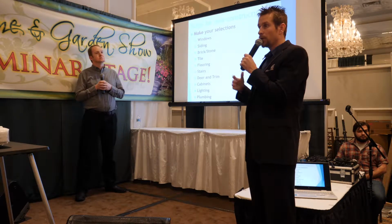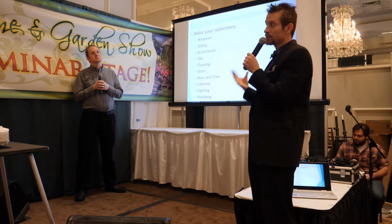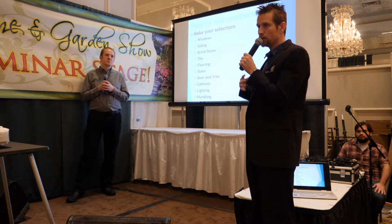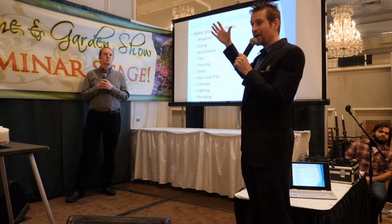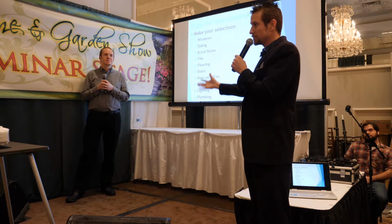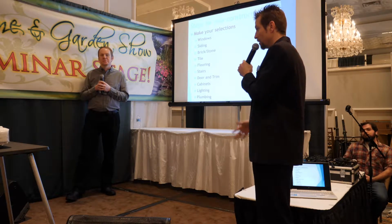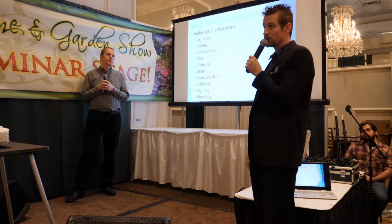So I'll give you an example. If you're looking for a house with a great resale value right now, the style of house you want to build is a farmhouse style home. Farmhouses are white homes, and a lot of them have white windows or black windows. The ones with the black windows sell for a lot more money. Now, once the windows are ordered and delivered and they're white windows, to get black windows most suppliers will probably charge you a restocking fee, and now it's more expensive, you waste more time, and your timeline is extended. So making those decisions up front is crucial to avoid change orders.